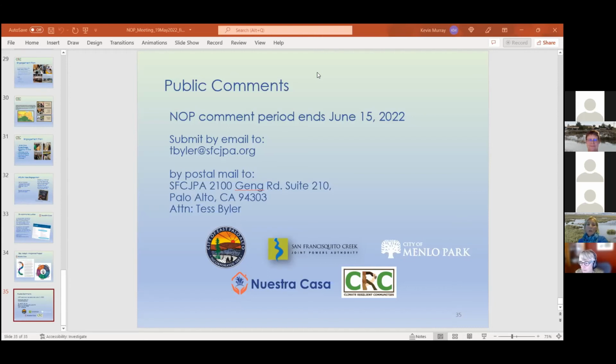The project sequence would be the areas in East Palo Alto and the restoration of former salt ponds R1 and R2 would likely be constructed first. This is to get the restoration going quickly, as well as provide flood protection for the Weeks and Gardens neighborhoods.